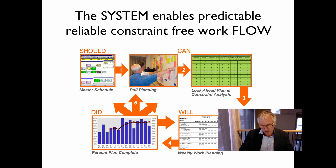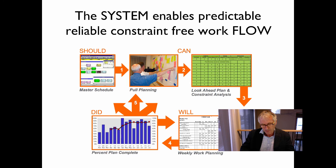Teams that adopt lean production systems are better able to plan and coordinate work, engage people to a higher level of commitment, and get work done in less time and with fewer resources. Last Planner System summary: there is a failure rate of 54% in planned work on traditional projects, and the Last Planner System helps to fix that.